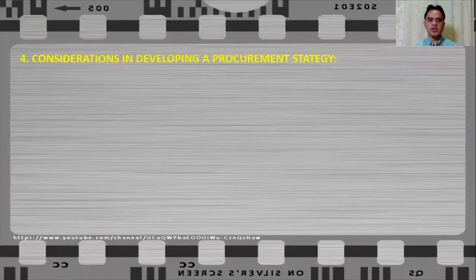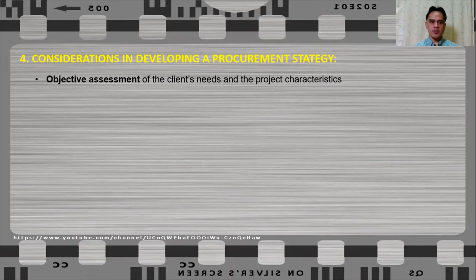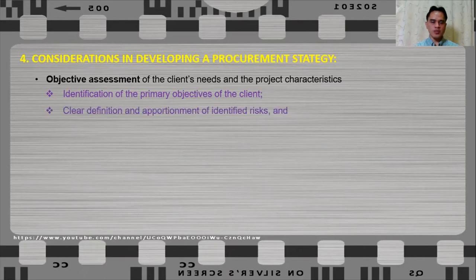The following are the considerations in developing a procurement strategy. First is an objective assessment of the client's needs and project characteristics through identification of the primary objectives of the client. And once these objectives have been identified along with associated risks, these risks should be clearly defined and apportioned.